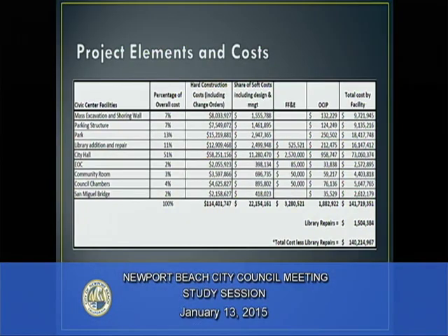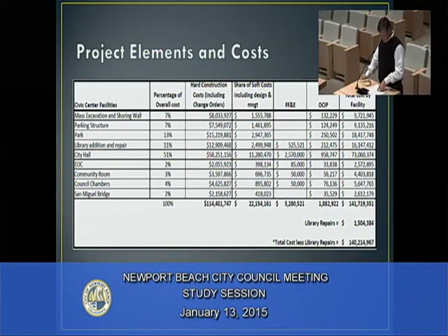From the closeout report, the city and CW Driver received a bid from the three pre-qualified bidders to design-build this 450-space parking structure on September 14, 2010. The city council approved amendment number one to CW Driver and contracted the design-build parking structure with Bomel Construction and a subcontractor, and amended the GMP to $7.4 million. As it looks up there, a design-build contract is a full-in type contract. So you give it to a contractor, they don't get a portion of the $1.4 million that's included in design and management, as I understand a design-build contract.